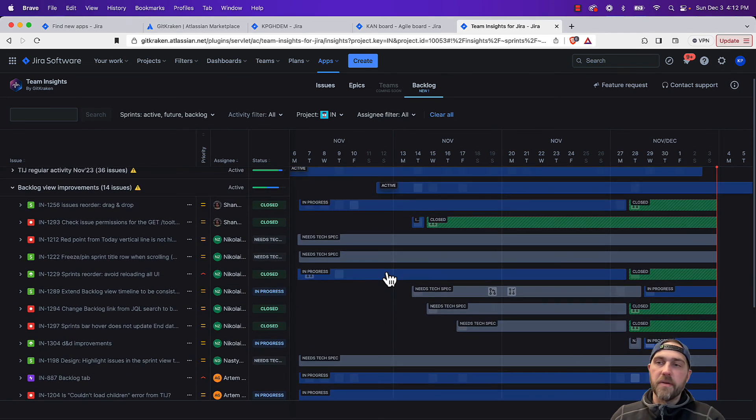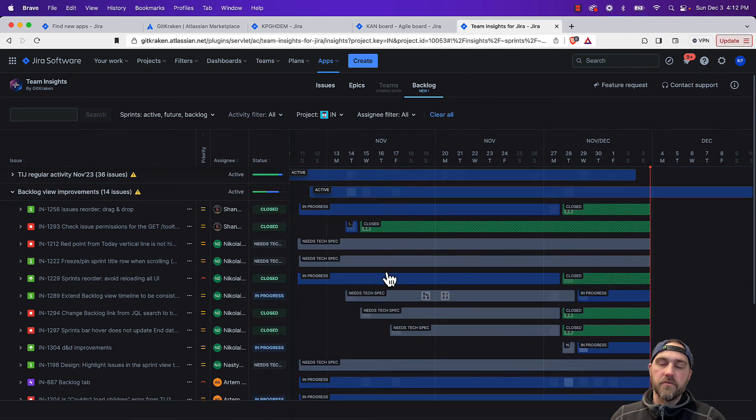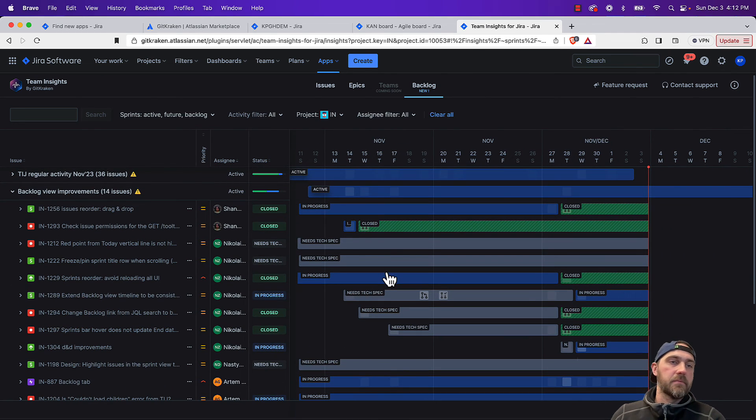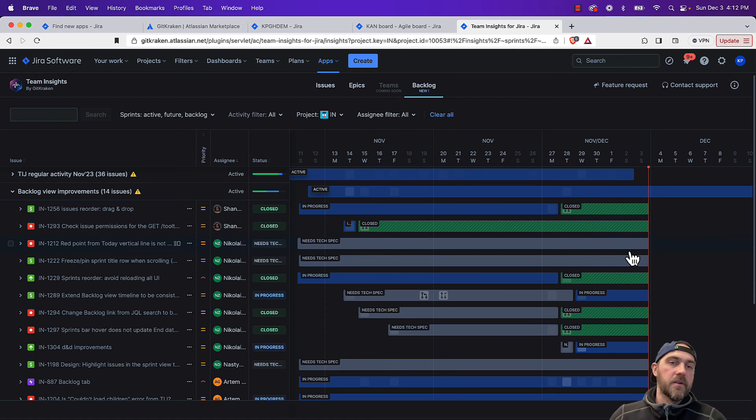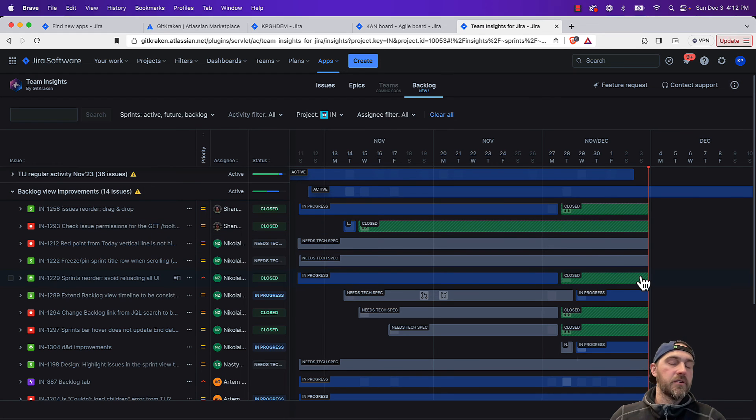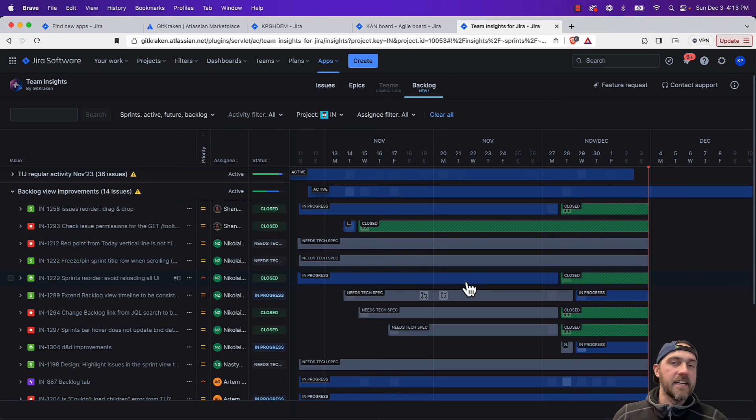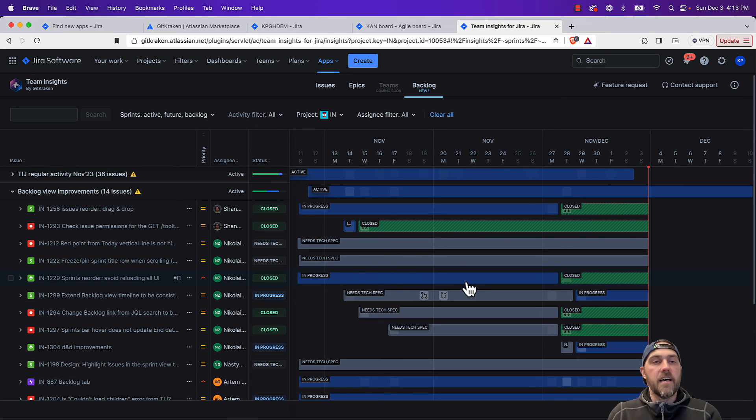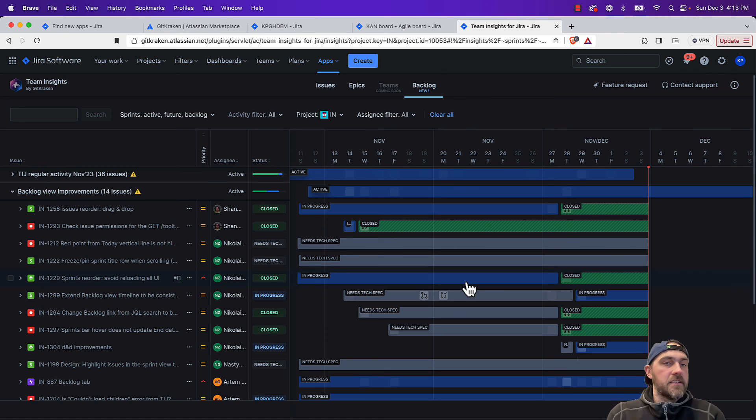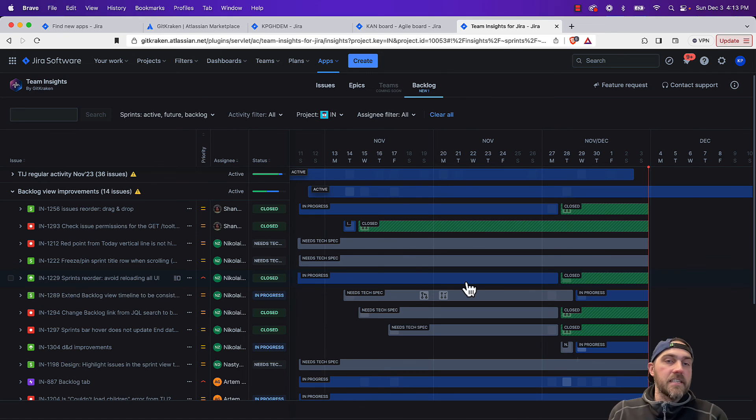So this particular backlog view is useful if you're coming up towards the end of the sprint. Basically, you want to see everything in the green zone. If something hasn't been started yet, or it's in progress, but you're not seeing any activity, no commits, no pull requests, obviously that's a great opportunity to go and then follow up with that developer.